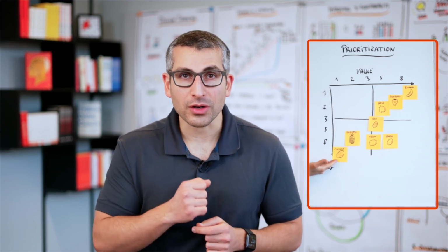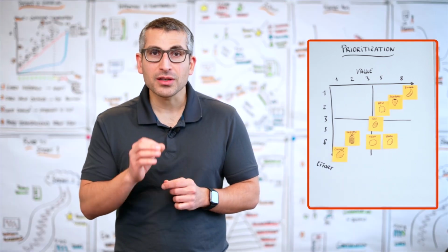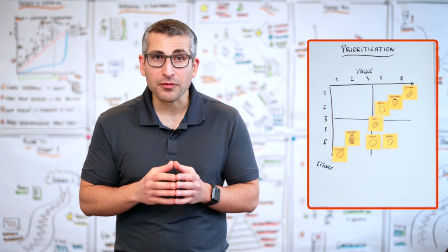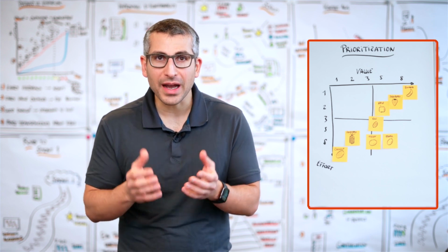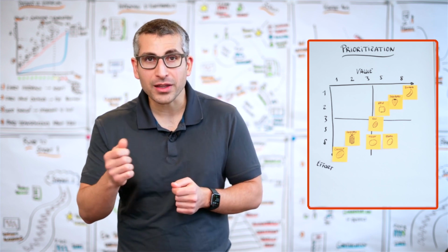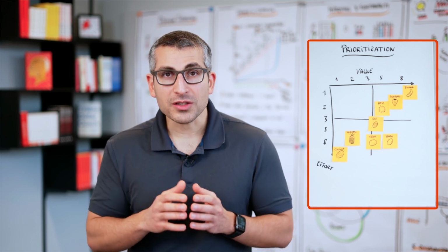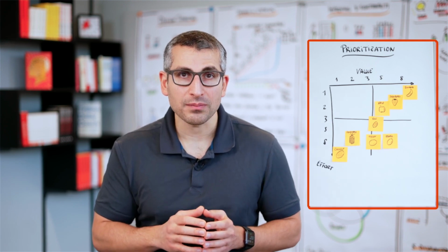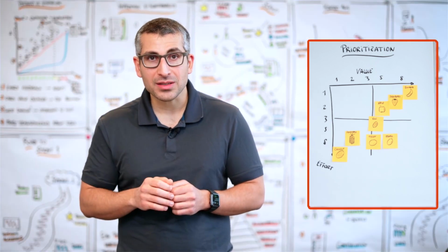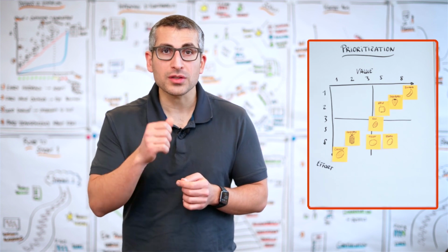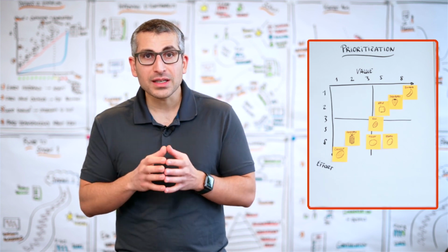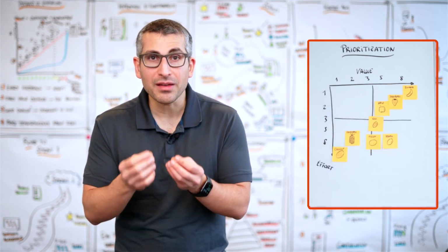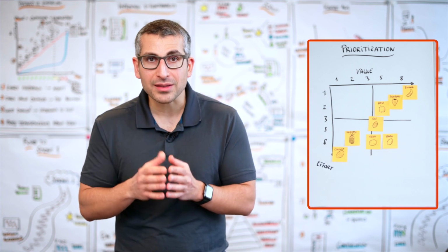For example, the coconut. Now, this type of prioritization considers 2 dimensions. The first one being the value, the second one being the effort. You can also look at it as some kind of return on invest, value for effort. When a product owner does prioritization, they in many cases need to account for other dimensions as well. One dimension could be technical dependencies that the developers highlight towards the product owner. In our current scenario, there are no technical dependencies. Each of these items can be delivered individually without impacting the others.